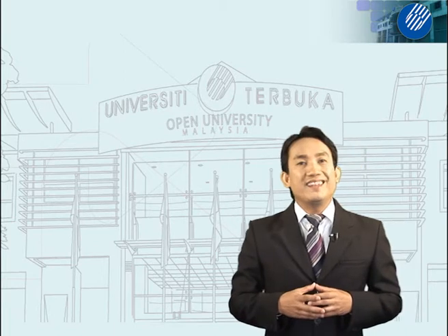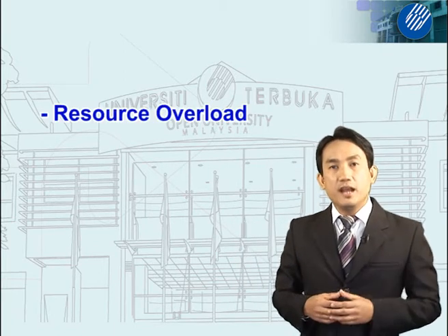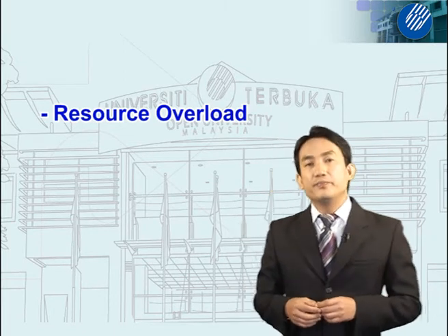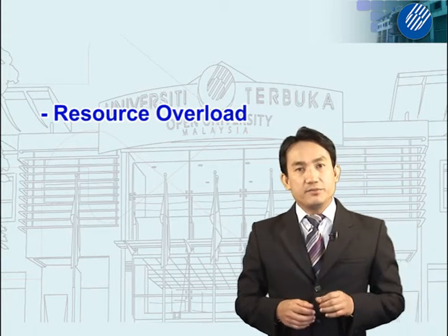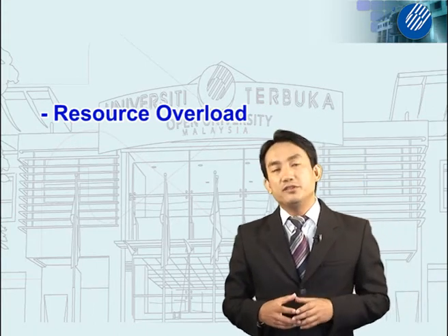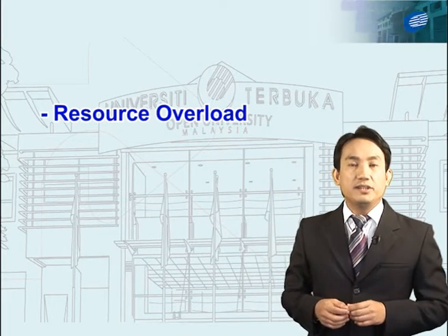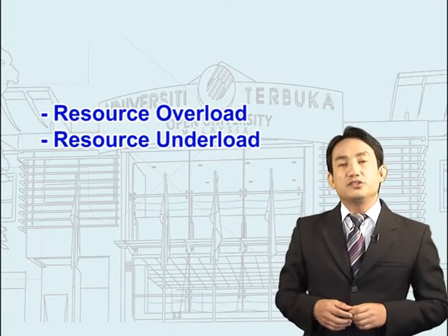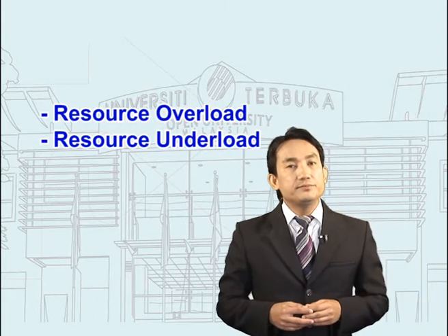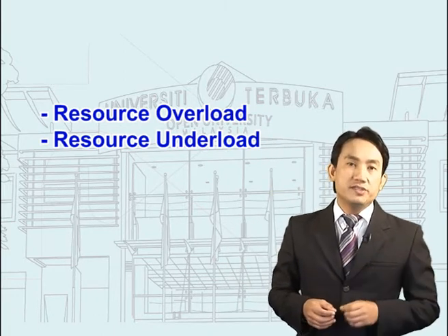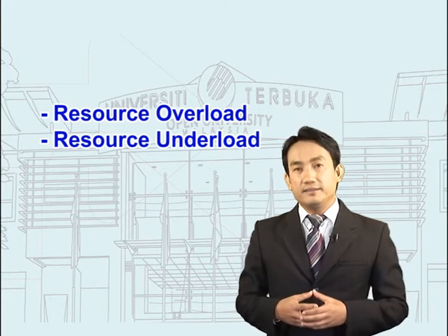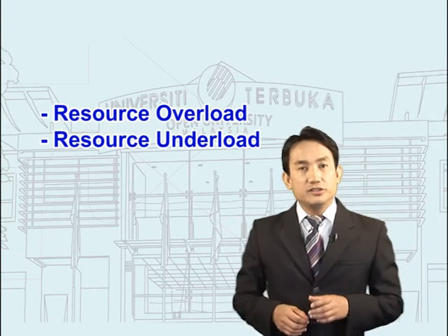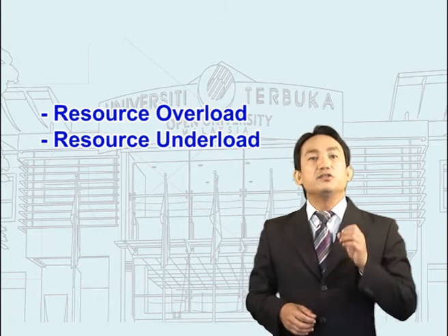There are two scenarios that impact your project. First, resource overload, where you require more resources than what you currently have. This will lead to the delay of the project because you do not have sufficient resources to execute the project activities. Second, resource underload, where you require fewer resources than what you currently have. For example, your resource requirement is 8 people and available resources are 10. This may not impact your project. However, the remaining resources will be idle and do nothing, but you still have to pay them.